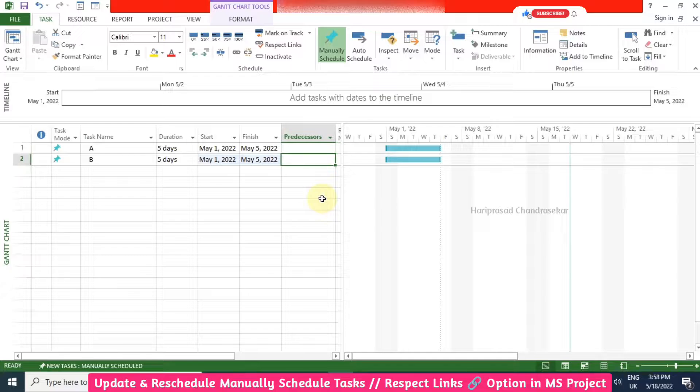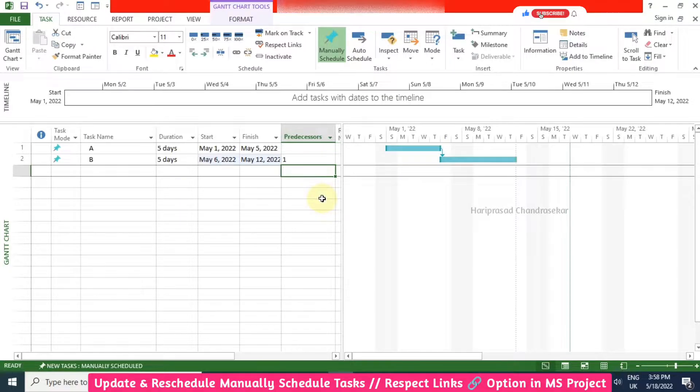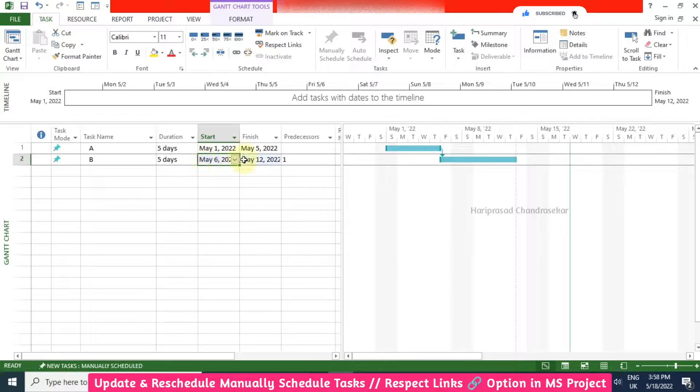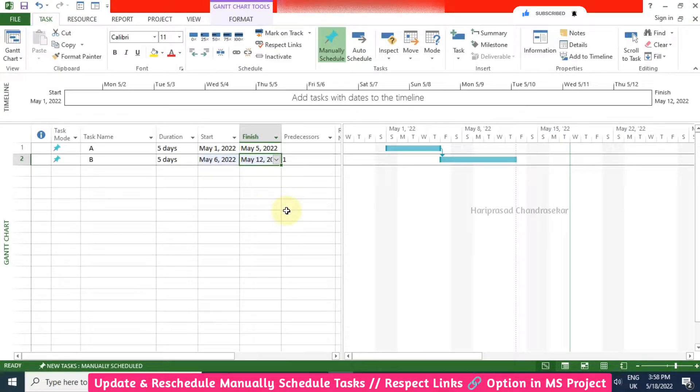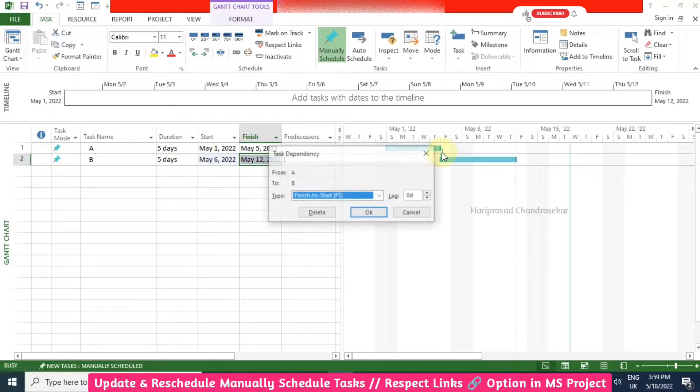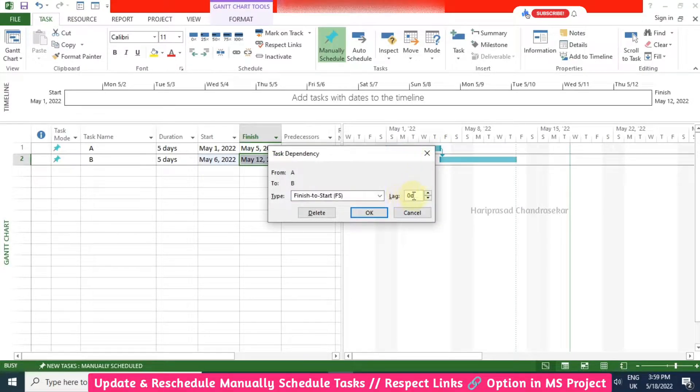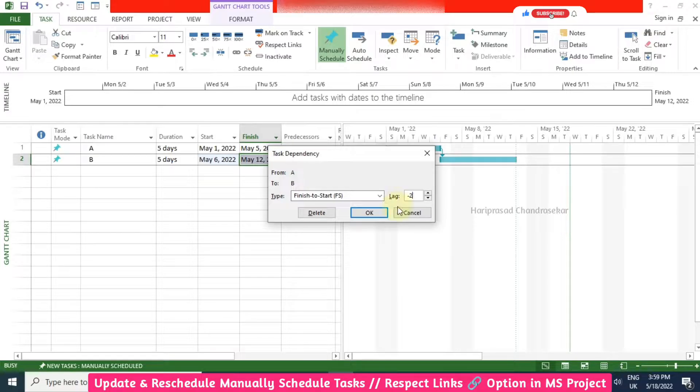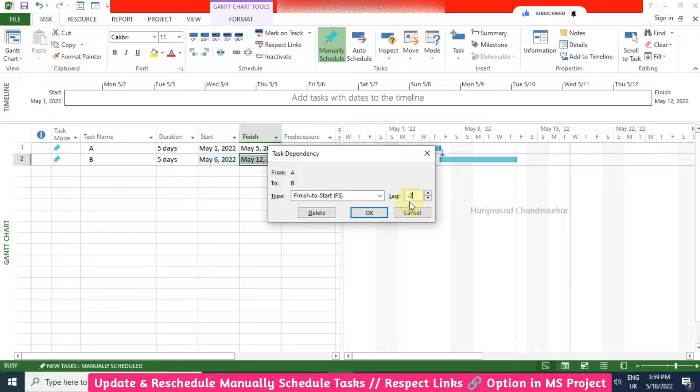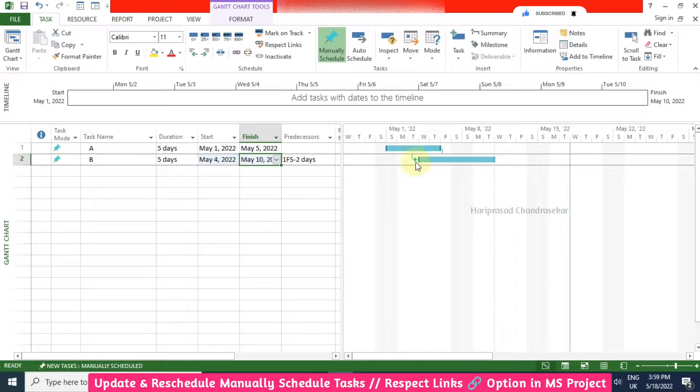Now I am going to input the predecessor as one, so it will automatically go to the finish to start relationship. The dates also changed. Now I am going to double click this and put some lag as minus 2. I am putting some lead, so that's why I am putting negative lag. Now also it is getting updated.